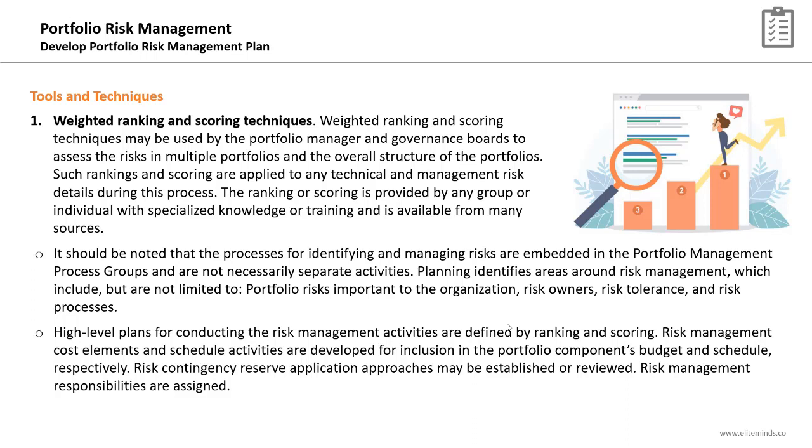well. Risk management cost elements and schedule activities are developed for inclusion in the portfolio components budget and schedule respectively. So all the activities we will be conducting as part of the risk management will be included in the portfolio schedule, and the budget for those activities will be included in the portfolio budget as well. Risk contingency reserve application approach may be established or reviewed, and risk management responsibilities are being assigned.